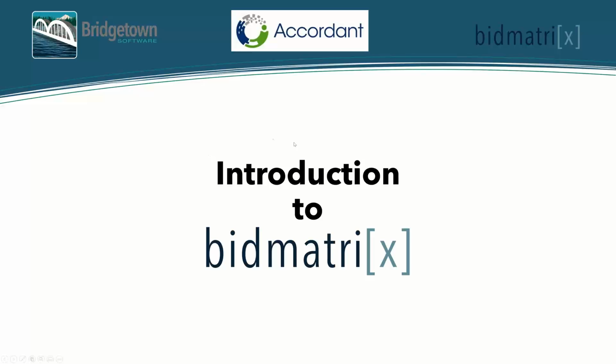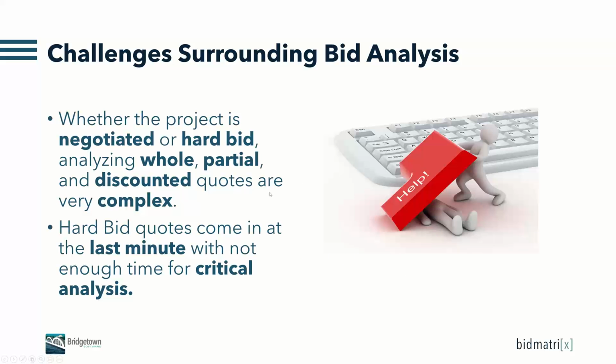So this is an introduction to BidMatrix. One of the reasons we did it is that there are a lot of challenges around bid analysis in the construction industry. Whether you're negotiating bids or doing hard bids, the subcontract quotes that come in are either whole, partial, discounted, all kinds of different flavors of bids coming in every single time we do a contract. We're trying to solve that and help reduce the complexity. The difference between hard bid and negotiated bid is that with negotiated bids you don't have the time constraints, but you still have the complexity of those bids.